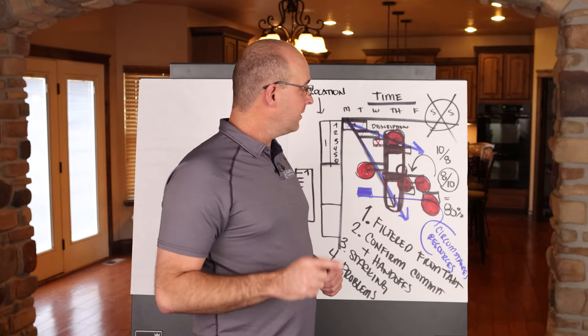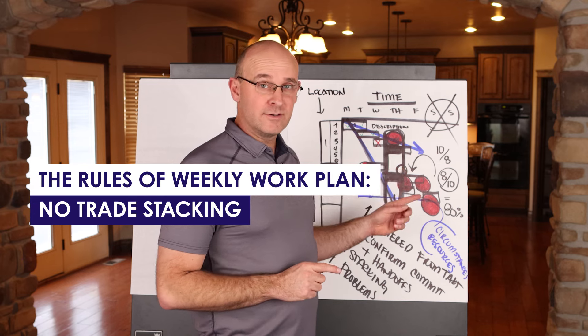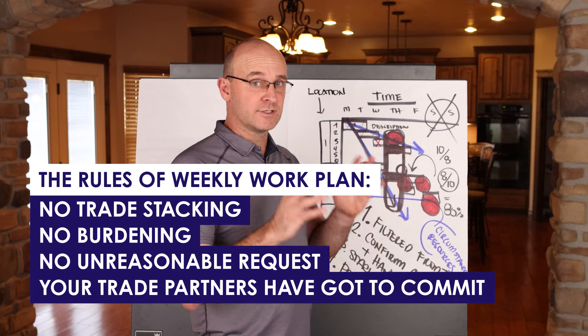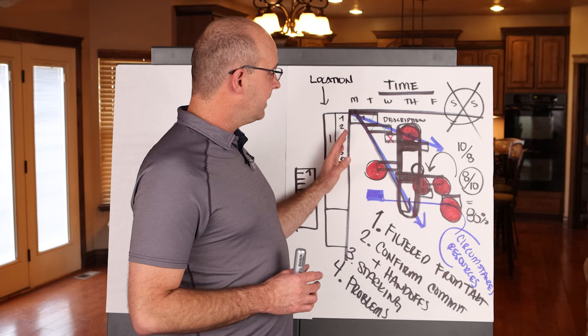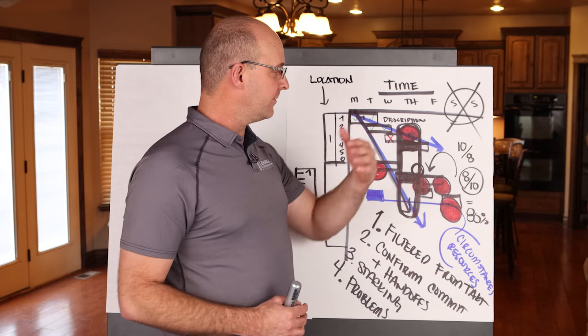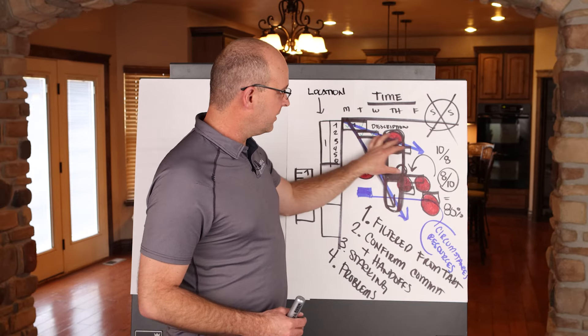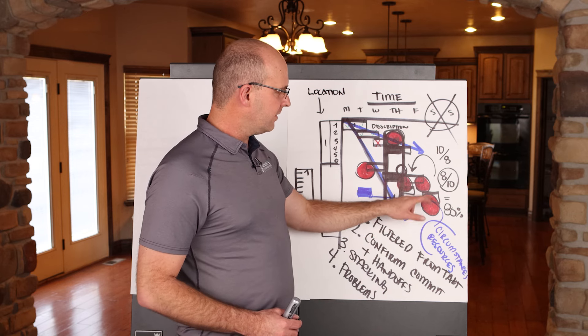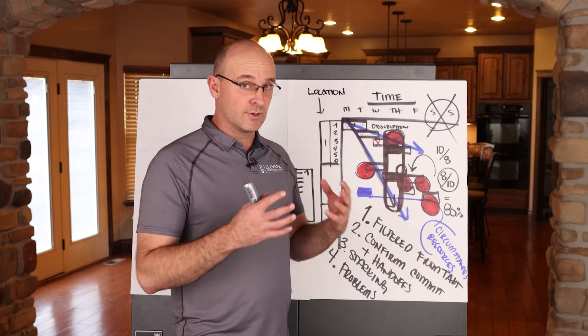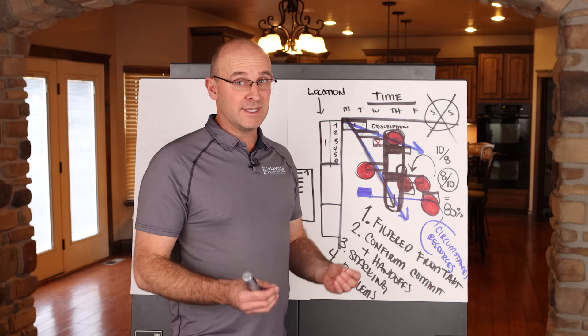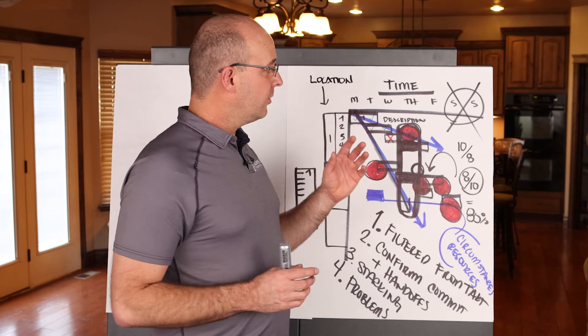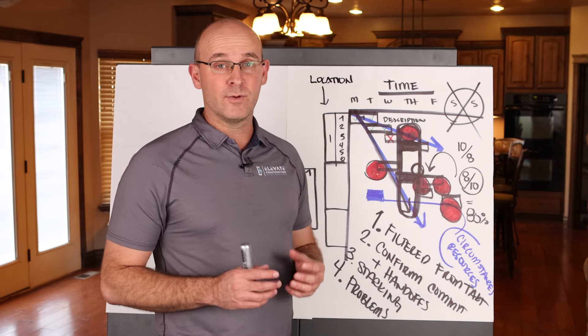The rules of weekly work planning are no trade stacking, no burdening, and no unreasonable requests. And your trade partners have got to commit with no sandbagging. And if you do this properly, you will have a plan, not only for the rest of this week, but for the rest of next week, that will get your activities done, that will flow, that will prepare activities, that will solve your problems, and that will really allow all the trade partners to work well together and commit and execute their work with a high likelihood for success. So I hope you've enjoyed this video about weekly work planning. It's literally a game changer.